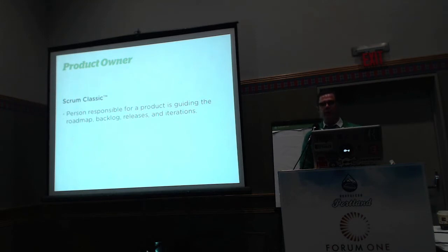But primarily the product owner is there to carry the project goals and vision, to understand what is being done and why, and prioritize work accordingly. Because it's not up to the team to decide what should be done. It's up to the team to decide how it should be done. So the product owner understands the vision and can make hard decisions, such as this release won't have whatever killer feature everybody wants in it because there's not enough time to get it done. So they handle those difficult calls.